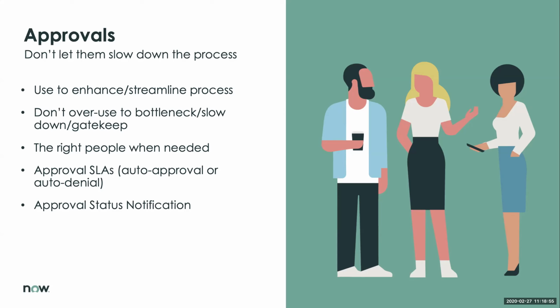You can have an SLA where that user would be reminded that they have an approval that's waiting for them. And you could then also have a point at which the platform would essentially automate the action. That could either be, you might say, well, after 5 business days, if there hasn't been a response, we'd consider that an auto approval and essentially move the work forward. Or we could consider it an auto rejection and say, well, if we haven't heard anything, we'll assume this work can't move forward. You also can set up delegates so that if someone is out on leave or something like that, then there can be someone else who might execute those approvals in their stead, so that obviously you don't want that to hold up the process.